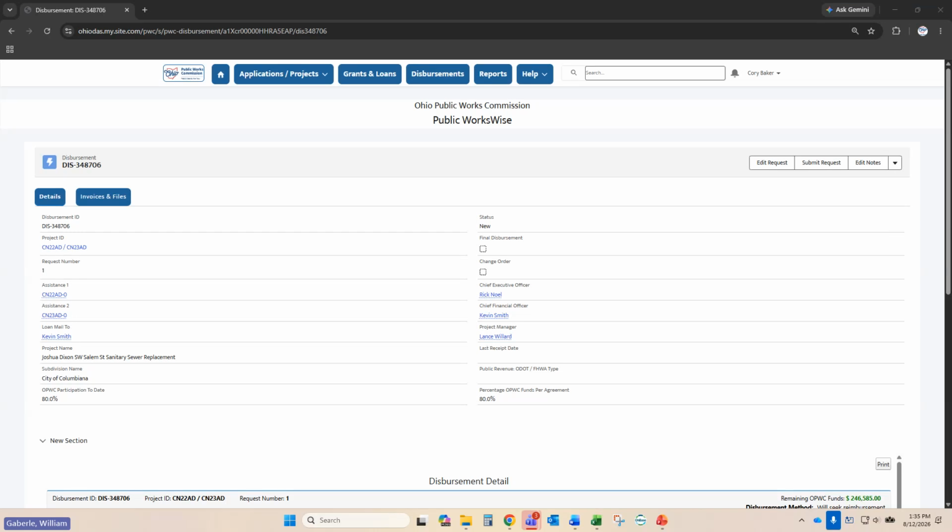You would want to attach that summary at the front end of those multiple invoices so that the person auditing or reviewing your disbursement request would be able to see your totals and then go to each of those invoices to see if those match your summary, and gives them a little clearer picture. But yes, when you upload your disbursement signature page, it should only be that.